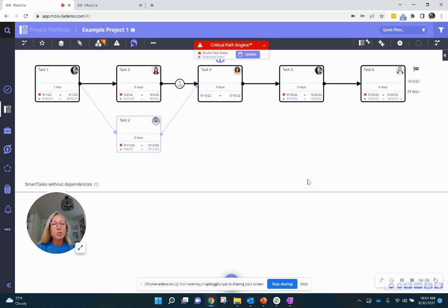But because I just made those changes, now Movable is saying, okay, well, the dates that you had selected there are now inaccurate. Here's what the new suggested dates would be. So I'd actually need to get started on August 30th. Today is August 30th, when we're recording this video. But it's taking all of that into consideration. So you never have to manually think about what your dates need to be within each of these tasks. But you have that option to just let the system base it off of the start of the project, or anchor one of those tasks. And the anchor could be the last task within that project schedule as well.